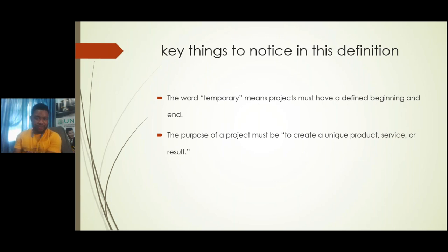has increased. As governments bring up policies that affect the economy, it also affects businesses, and businesses will want to pass on the changes to whatever they are doing. So you can go to the market, and a bag of cement sells for 1,005, and the following day you discover that it's 2,000 naira. So the historical information your friend gave you doesn't mean you have to inherit that budget. You have to take your time and plan your own project.